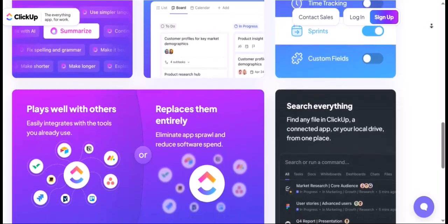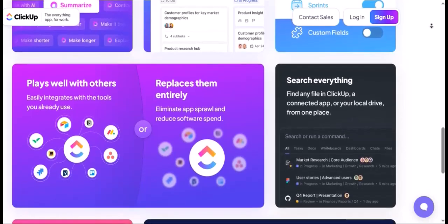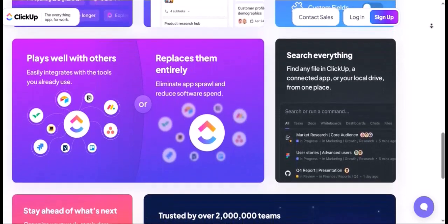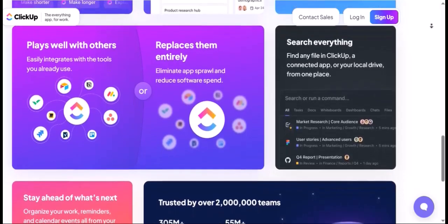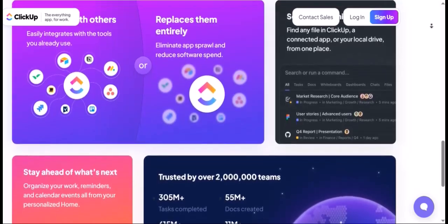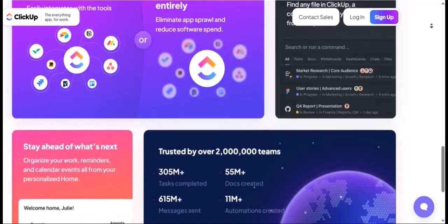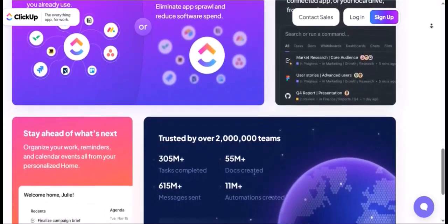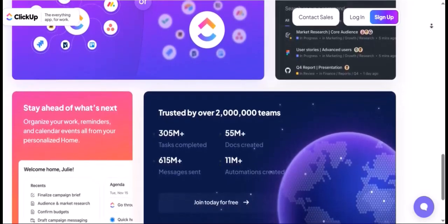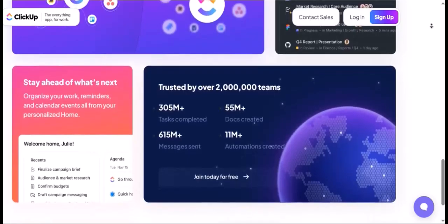1. Budget tracking and expense management. Imagine a project with a defined budget. Within ClickUp, you can create a space or folder for a specific project. Each task within that project can represent a line item in your budget. You can then use custom fields to track: Allocated budget, a numerical custom field for the initial budget for that task or expense category. Actual spend, another numerical custom field to log real-time expenditures.